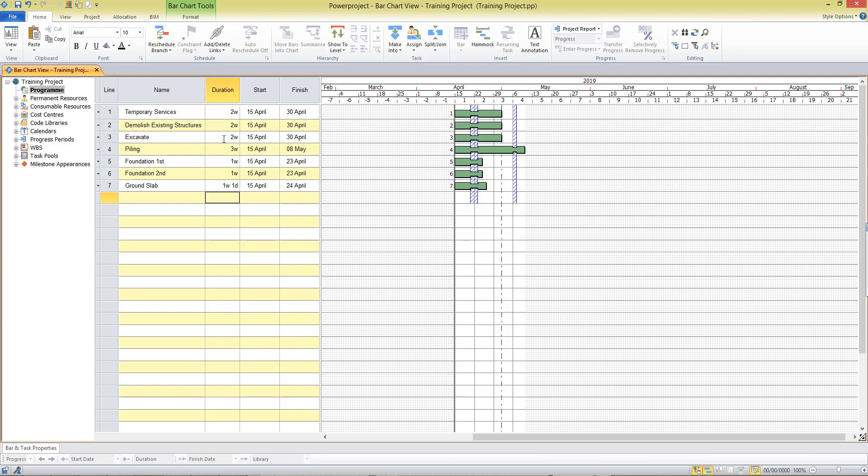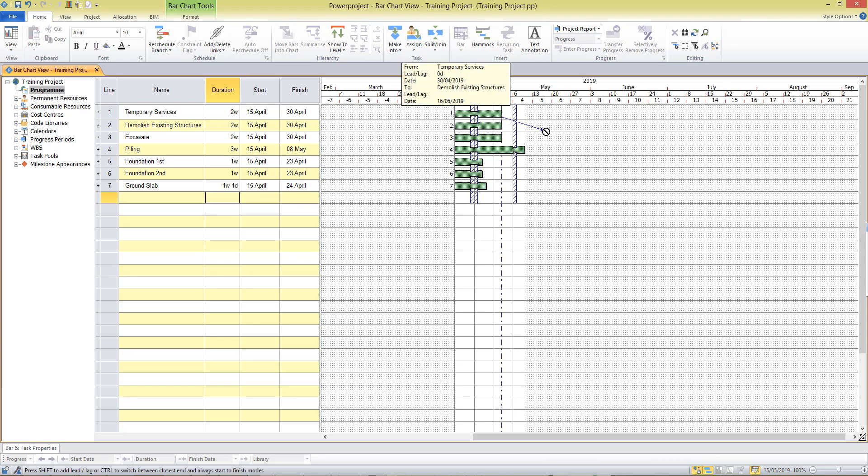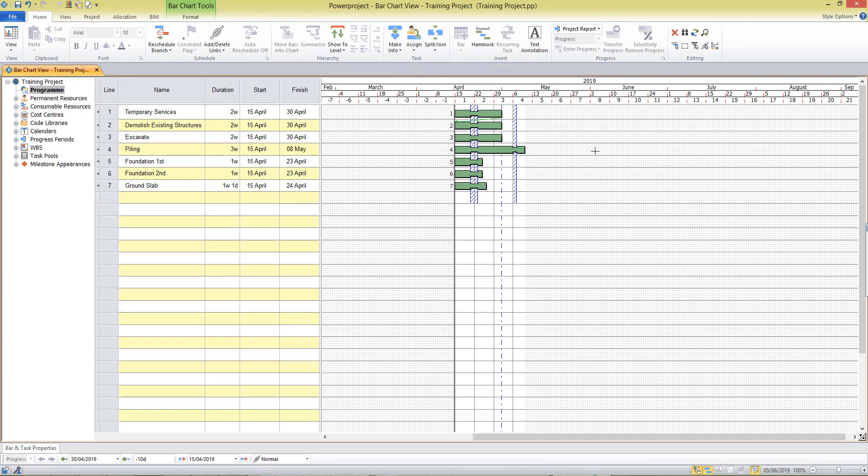Once we've entered our tasks we now have to consider the logic, the relationships between them. And in Power Project we can draw our links simply by placing our cursor at the end of a task and we see our finish link cursor there. Pulling away from the task I'm starting to draw a link and I can take that to the start of the successor task to put in a finish to start relationship between those two tasks.